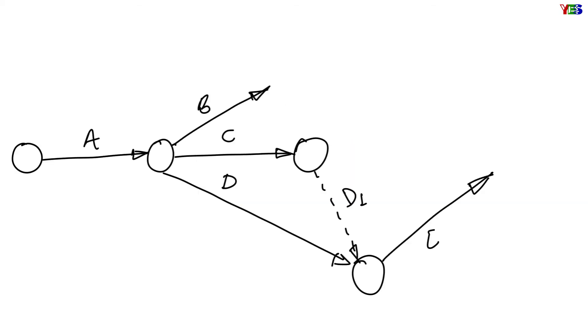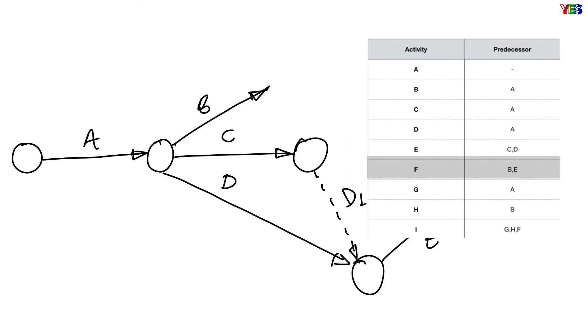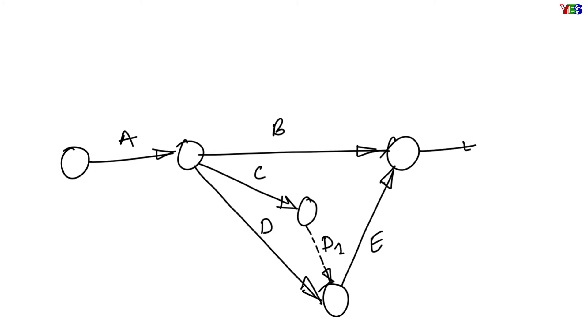In this example, activity C. Next, activity F we have after completion of B and E simultaneously, so we will make a head event for activity B and E. Here we can make same head event since their tail events are different.